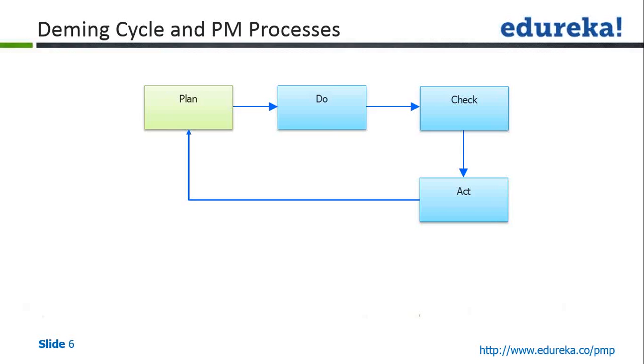So the project team, under the guidance of the project manager, needs to do an analysis of what has changed, what has not worked, why it did not work, and what is needed to bring the plan or the work back on track, back on the plan. Okay, they will look at the impact of the deviation on your scope, time, cost, risk, quality, and other factors and resources as well.